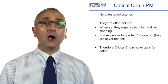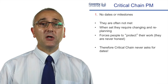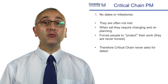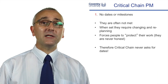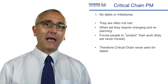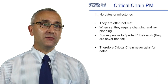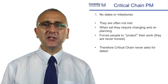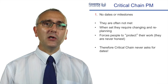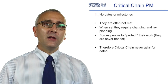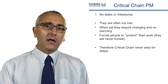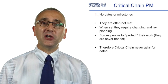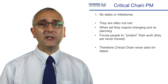Our first concept: we're not going to ask for dates because people don't meet them, because they're always changing, and when we don't meet a date we're going to have to replan. If we don't put any dates in our plan, then it's never going to look out of date. Critical chain suggests that the dates are fictitious anyway because people protect their work — they never deliver early. They put extra time in their task estimates, so the dates are not accurate.